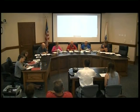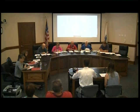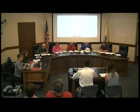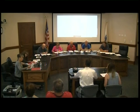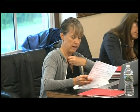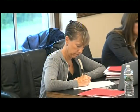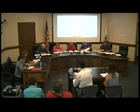I move that we consider this to be a small project under the letter L. Second. All those in favor say aye. Aye. Opposed? And that's unanimous. And accordingly, I move that we approve the small project as identified with, Jen, what do you want for pre and post? For special conditions, I had erosion control, a 12-inch compost bark filter sock, pre and post construction inspections, and a requirement to have the knotweed bagged and incinerated. So moved. Second. All those in favor say aye. Aye. Opposed? And that's unanimous. Well said.